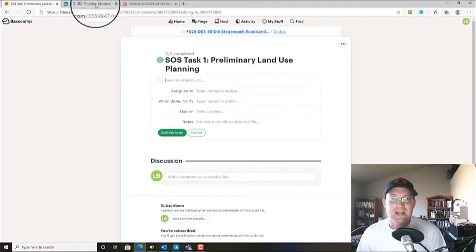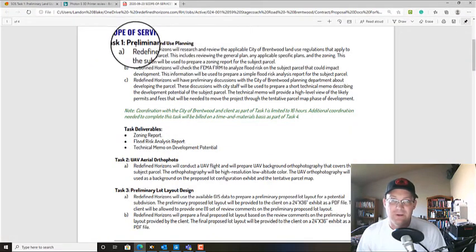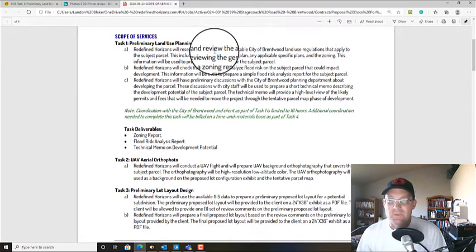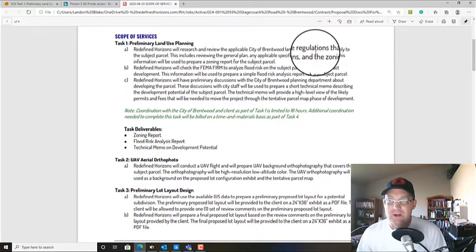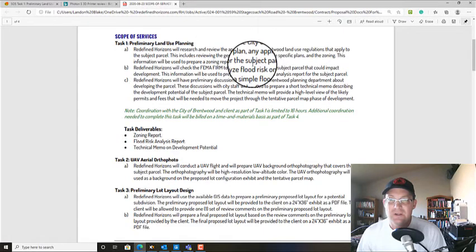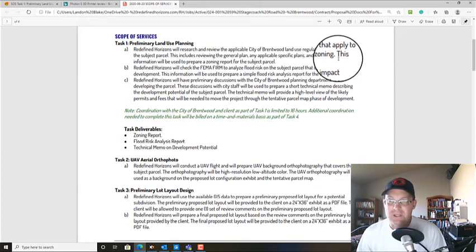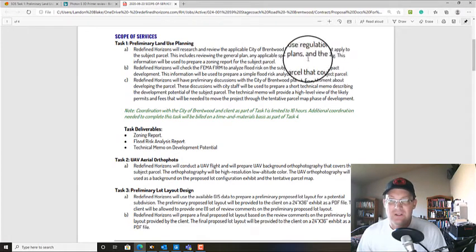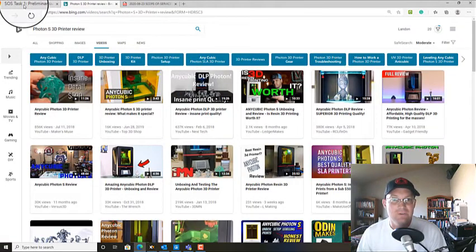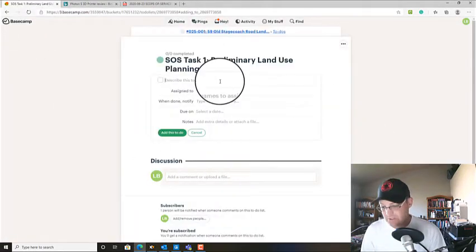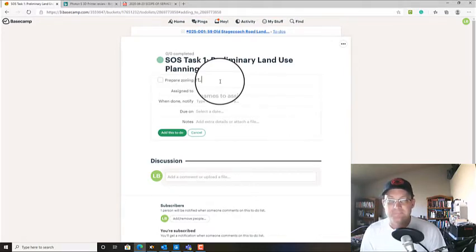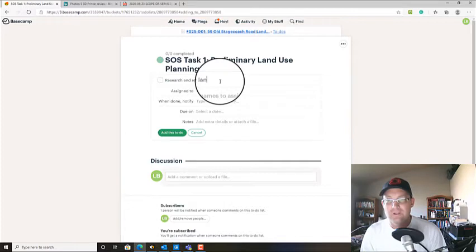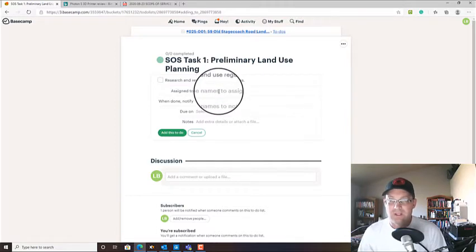So now we've got a new task list and then we want to say, what do we got to do in here? So we need to research and review the applicable city Brentwood land use regulations. And that includes the general plan, specific plan and zoning, and then prepare zoning report. So what we're going to do, we're going to say research and review land use regulations first.